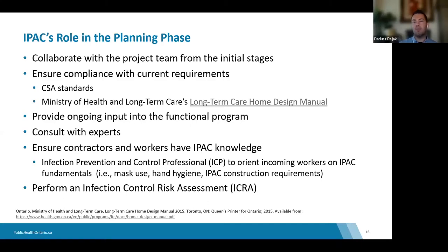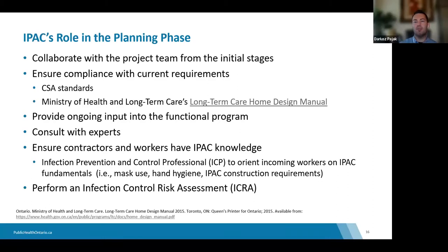By functional program, the goal is to ensure that projects consider and implement all key IPAC features and measures so that the completed build is a safe place to work. This includes elements such as spacing, ensuring proper placement of hand hygiene products, doing walkthroughs to confirm alcohol-based hand rub is placed appropriately, and ensuring all finishes are cleanable, durable, and will withstand repeated use of hospital disinfectants.